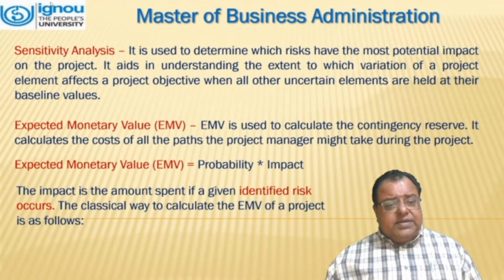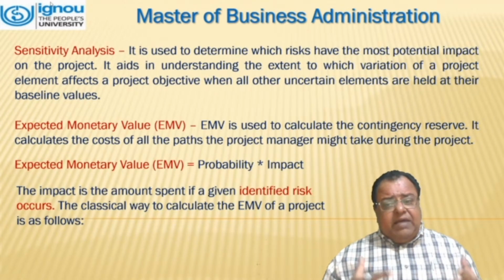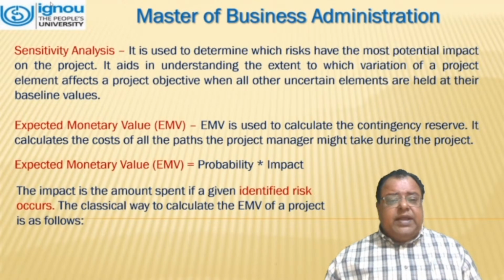Sensitivity analysis. It is used to determine which risks have the most potential impact on the project. It aids in understanding the extent to which variation of a project element affects a project objective when all other uncertain elements are held at their baseline values.